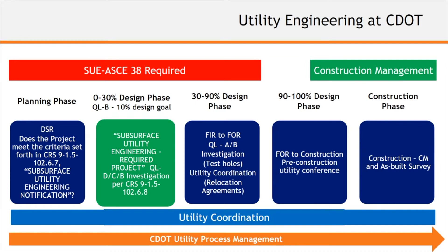When you look at subsurface utility engineering investigations — Quality Level B — trying to obtain that data by 10% design and allowing designers the time to leverage that SUE information up to 30% design will shape the utility conflict matrix much better. You've had the ability to design with Quality Level B information, or even just good existing utility data, in order to build that utility conflict matrix.